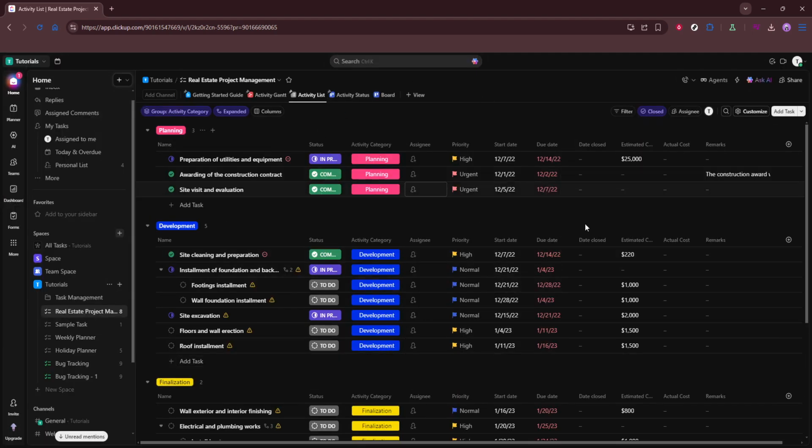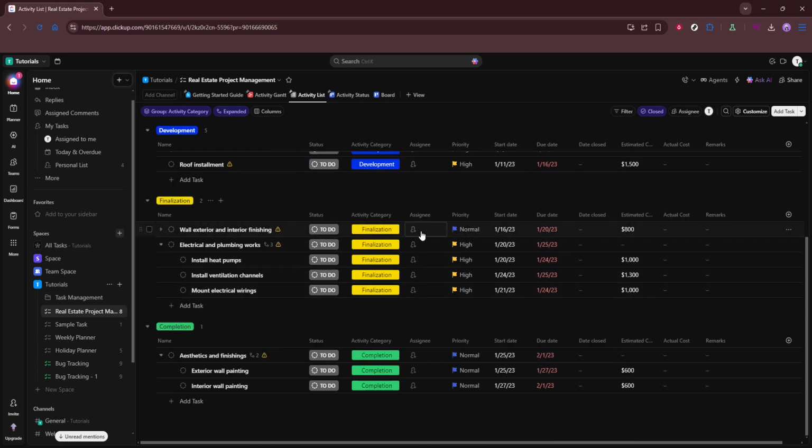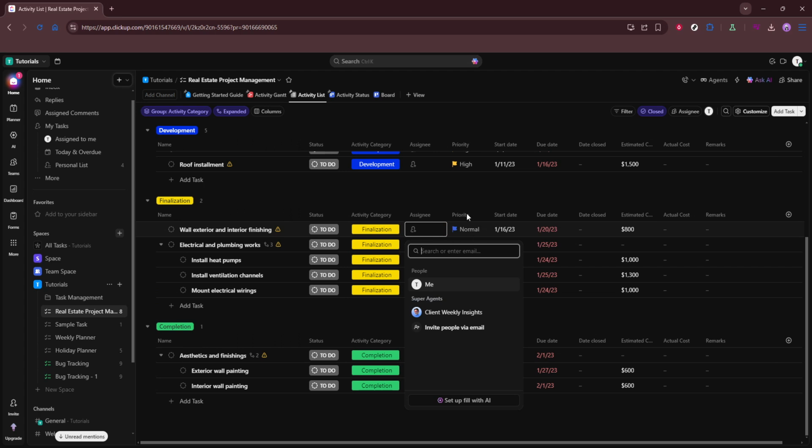With the template in place, refine the hierarchy and add automation. Adjust your space, folders, and lists to mirror your project phases. Rename items so budgets, tasks, and milestones read clearly. Add or tweak custom fields like planned budget, actual cost, and cost variance.